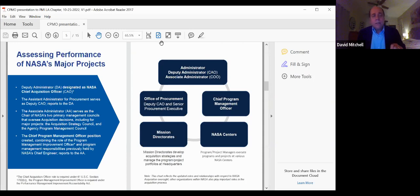It's much more than a title. It is something that Pam Elroy has initiated, and she's very much involved with what we're doing with our early acquisition planning. In the past, it was felt that some of the decisions brought forth as a new way of doing business or acquisition were brought to the top floor of headquarters already somewhat well formed. So what Pam wanted to do was have something called a decision framing meeting, where there was the opportunity early to talk through the different options and not just bring one solution. A proposed solution might be brought up, but other options had to be brought along with the analysis of those alternatives. So we have a much more robust discussion at the early end of acquisition planning. That's just one example of an aspect she's bringing to that.